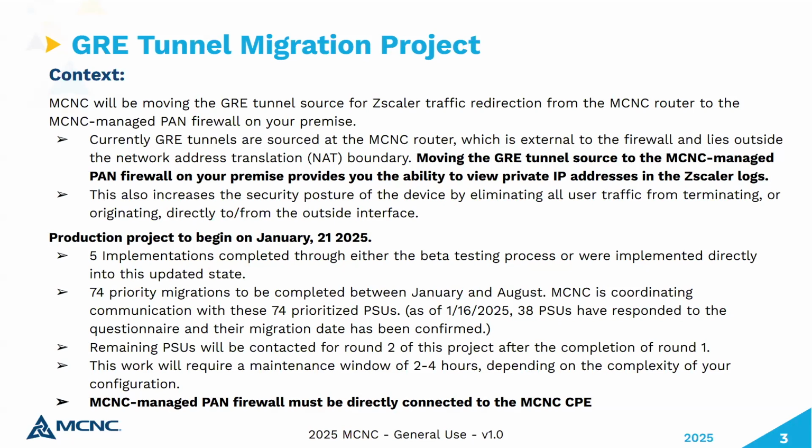But we also ask that question on the questionnaire just so that we can reconcile your answers with what we've already got documented. We will be creating separate, smaller projects to work with you as needed to get those switches removed to alternative configurations prior to doing the GRE migration to the PAN firewall.